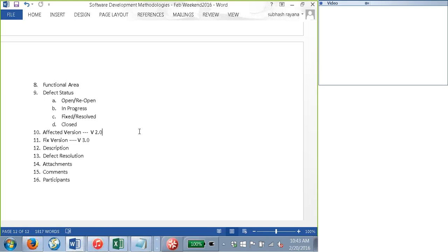See, what happens is, technically, every week there will be releases, or every 2 weeks there will be releases. So let us say we have a software development life cycle for a 2-month window. We are starting testing today, and we are giving fixes every week. So let us say every Monday, they will have a release, and for that particular Monday, they will have a number defined, saying that next Monday we are releasing 2.0. So there is a window, right? Everybody has to be ready for pushing all the code into that window. If you miss the window, then it will be 3.0 next Monday. It's like, when you go to a bus stop, just because you went to a bus stop doesn't mean that you are ready to go. You have to have the bus, right?